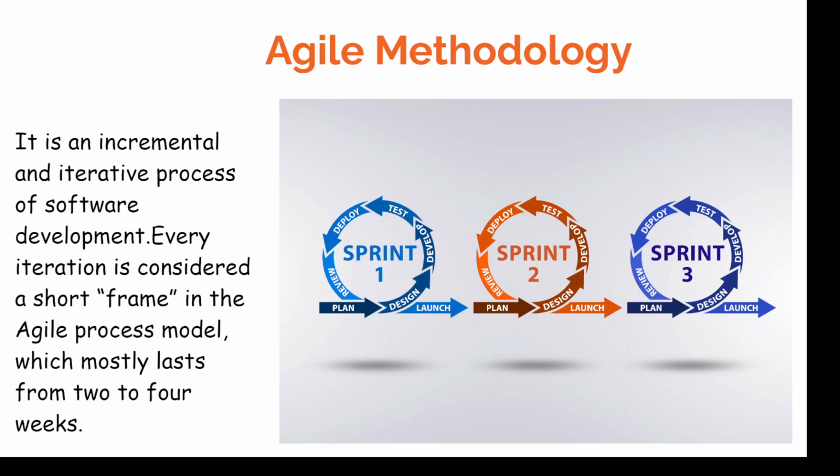You do a retrospective where you review what has been deployed, and quickly you start a new sprint to incorporate the next feature that should be coming in. So a customer can make a review within 2 to 4 weeks, since that's the period given for a product launch.